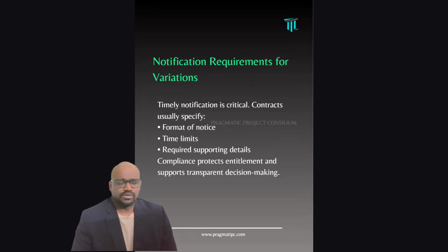Recently, I had a discussion with one of my followers who is from a PMC background. He said that their contract clearly says that the notice for variation shall be separate and shall not be mixed with any other notifications. Then we shared the notice, and we can clearly understand that it is a variation, but it speaks about some other issues also, and the subject is not written as notice of variation.